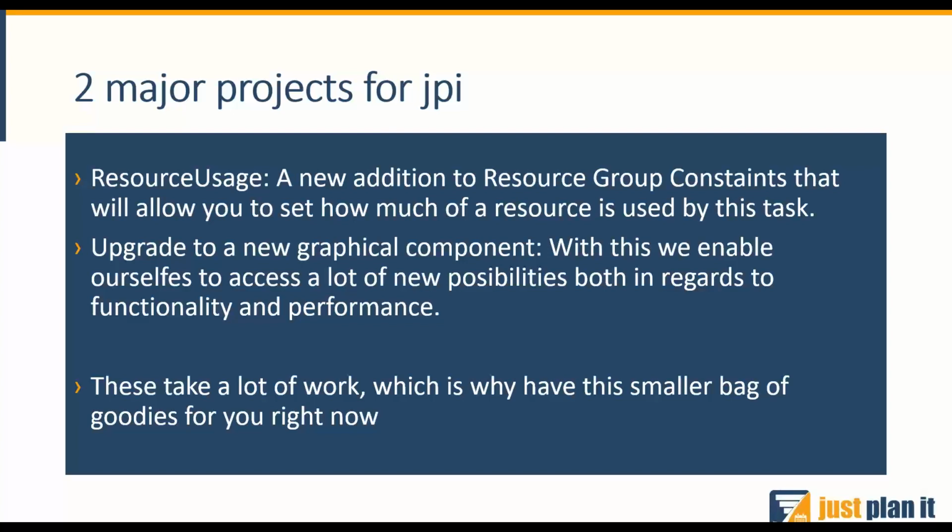But the operator that is also necessary to overlook how the machine is progressing can basically monitor 10 of those at once. So you give the specific task a secondary resource for the operator and set that to 0.1, and then that operator knows with a capacity of 0.1 only being set for the task, can basically work on 10 of those tasks at a time.